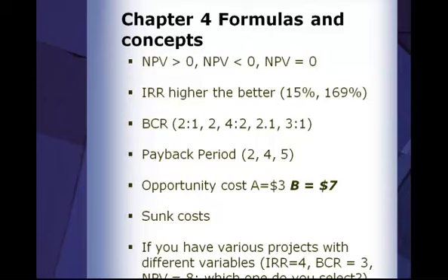Hopefully you're familiar with most of these concepts: net present value, IRR, BCR, payback period, and so on. Talking about net present value, if you have net present value greater than 0, good, accept. Less than 0, not good, don't accept. NPV equal to 0, there could be lots of other criteria. It means it's neutral, but there could be other factors that surround the circumstance, and based on those factors you might choose to accept or reject the project.